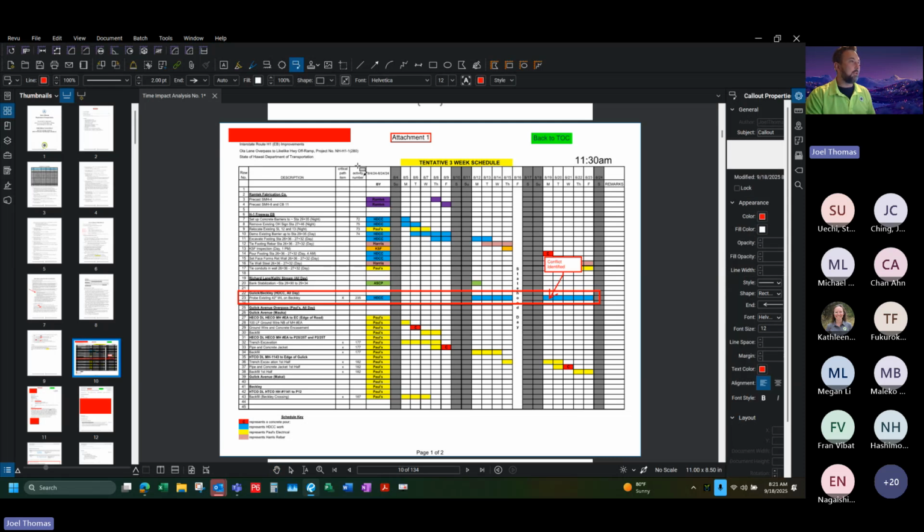You would add an as-built week, and that would actually be the easiest way to keep track of your as-built schedule. So if you're keeping track of your schedule and wanted to do it weekly, you ask your contractor, hey, can you add in an as-built week so that we can take that data every week and create an as-built schedule.